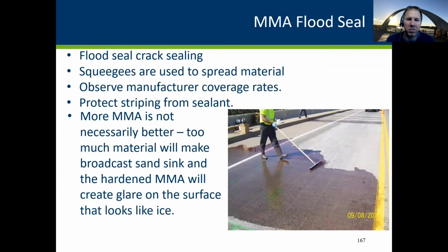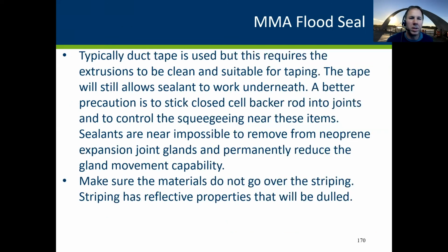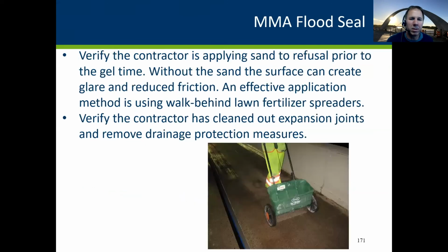You will note the striping, and we really don't want the striping covered up by the sealant because there is a reflective property to the striping. So the best contractors come in with duct tape and protect that and then peel it up after that is hardened. Otherwise, that striping replacement is on the contractor's dime.